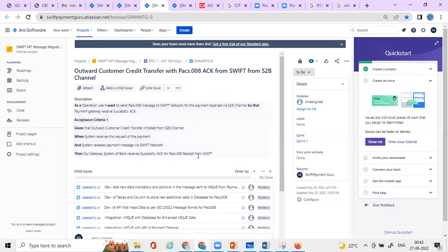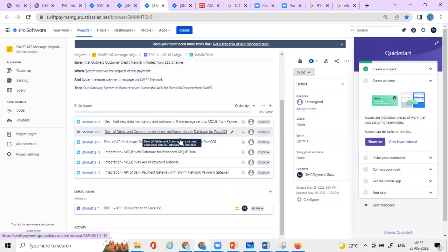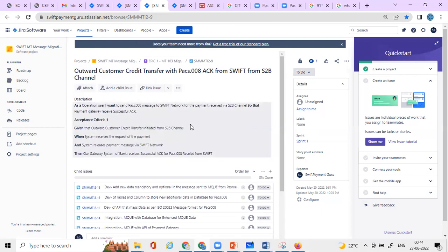So if this acceptance criteria is met after the necessary development, and when the tester tests it and you identify the same working, then this user story will be completed. But not the epic, because there are multiple user stories under this epic. So this would also be signed off by your product owner and the stakeholder, that if it meets, then this is also good, right?